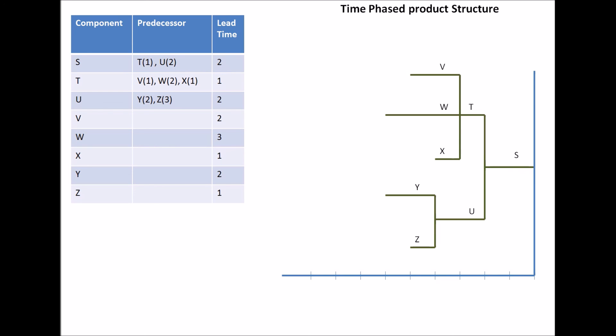Now, once we get that, we just mark the last part of the chart, or the end, or the leftmost part of the chart. And this is what it is right here, in this particular case. And that would be the starting point to mark our axis. So, we start labeling them like that. So, we now know that we should complete our assembly of Product S by the end of week 6.